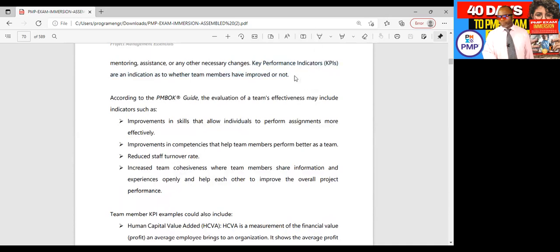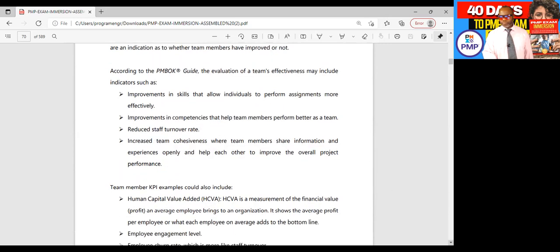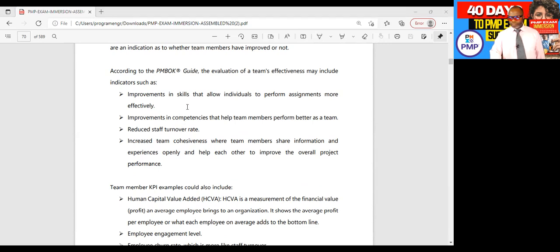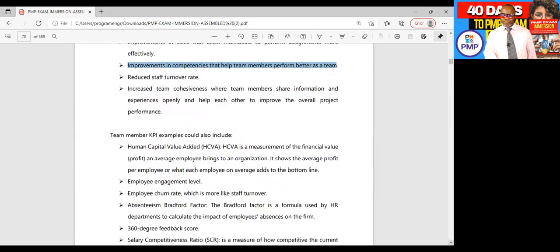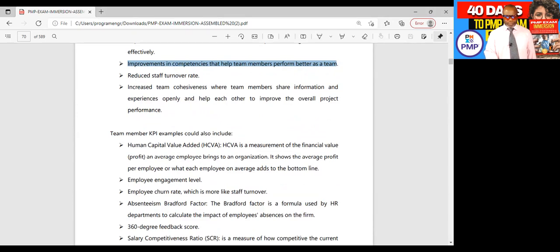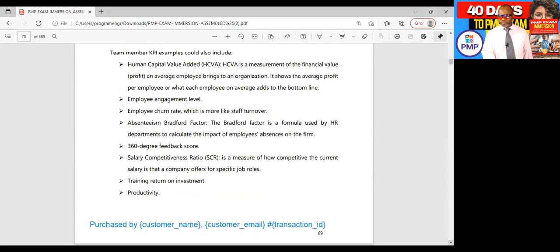Key performance indicators (KPIs) are an indication as to whether team members have improved or not. According to the PMBOK guide, the evaluation of a team's effectiveness may include indicators such as improvements in skills that allow individuals to perform assignments more effectively, improvements in competencies that help team members perform better as a team, reduced staff turnover rate, and increased team cohesiveness where team members share information and experiences openly and help each other to improve the overall project performance.